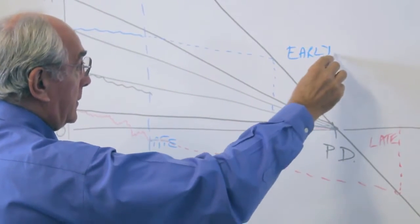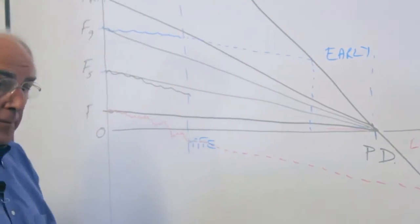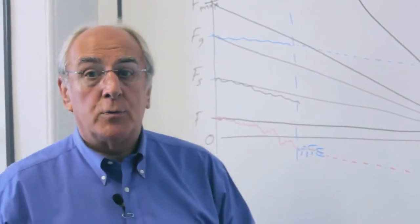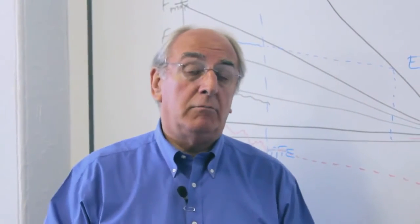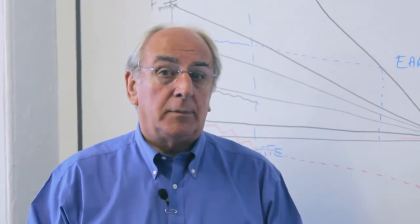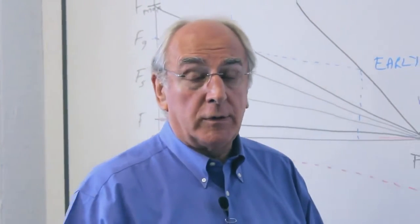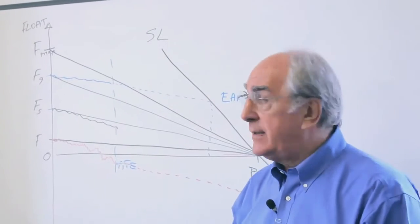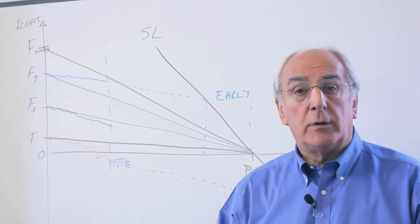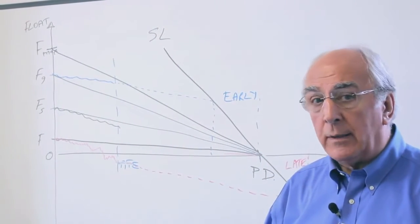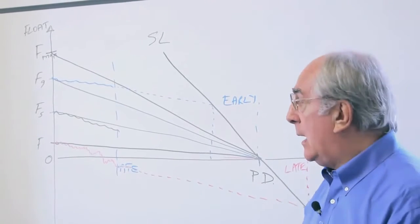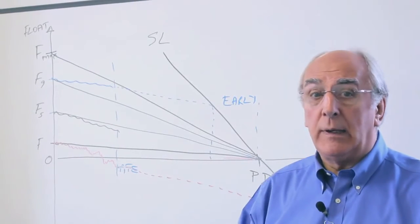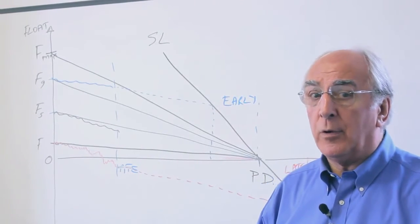The upshot of this is the non-urgent work, usually fairly easy, is being provided with a lot of resources and it looks like it's going to be finished early. Whereas the difficult stuff, usually on the critical path, is not being done on time and suffers perhaps with the lack of resources, certainly with a lack of progress.